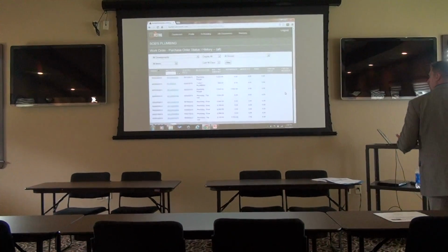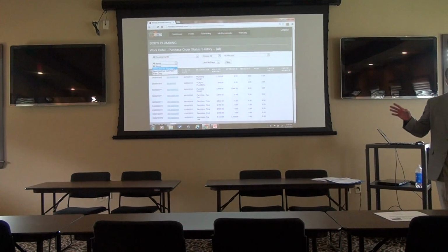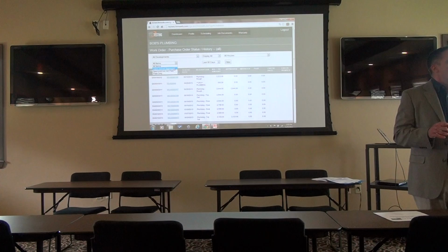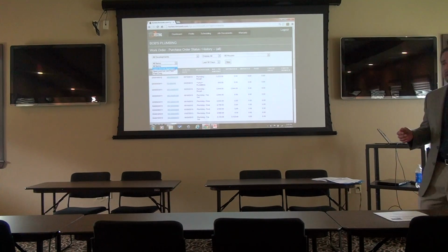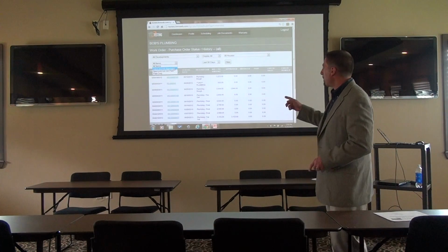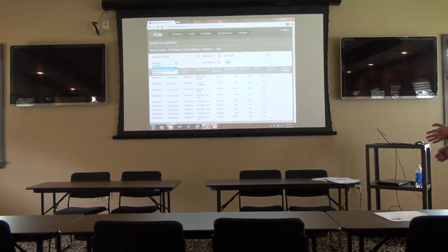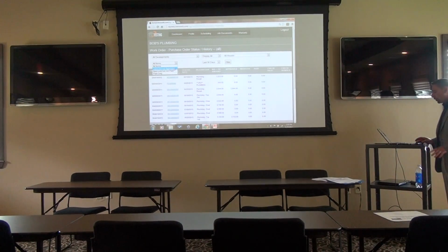Here's a little bit of a cue as to how this could be productive for you. If you look over here where it says all items, you can look at open but not approved. If the work orders and purchase orders are open but they're not approved, that means they were created but superintendents didn't check them off as complete yet. So that means that you probably didn't do the work yet. So based on your order lead time, this is your long-term receivables. This is your committed work to you that you didn't do yet.